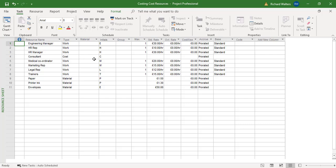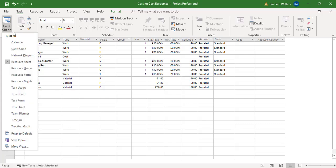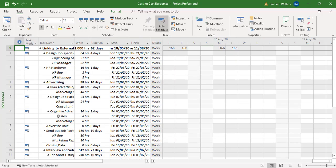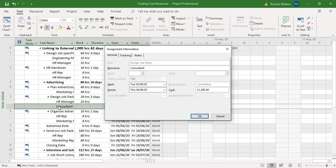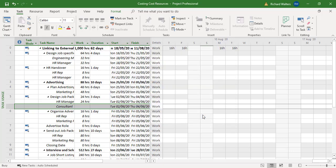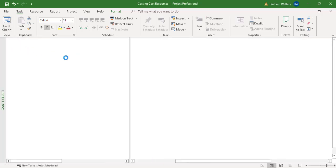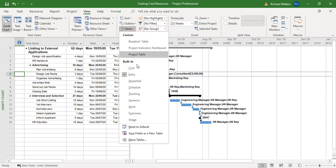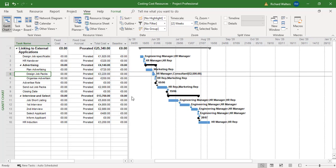So a cost resource now, I added the cost to the cost resource. And I'll go to task usage view and then if I double click the consultant, there's the £1,500 I put in. If I say for example, if this was incorrect and it was £2,500, quickly update it. £2,500, Gantt chart shows the update, cost table will show the impact on cost. And there we go, it's updated itself again.